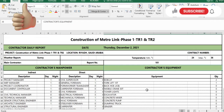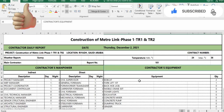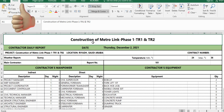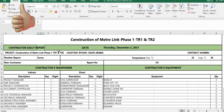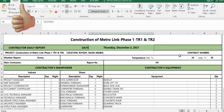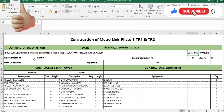Today I will show this in my daily progress report. Here is the name of the project report. You have to put the date, contract number if applicable, location, and weather — you have to update the weather condition whether it's sunny, cloudy, or rainy.